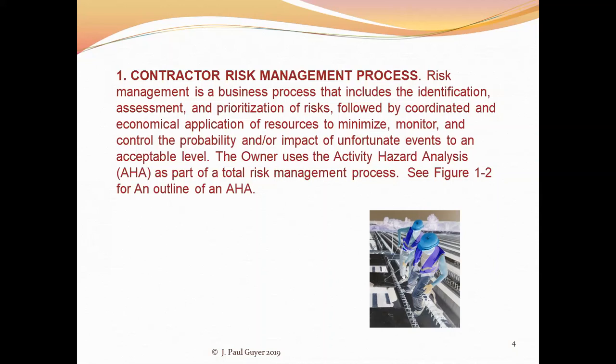And so you identify generically in a risk management process, identify the risks, assess them in two ways, for their potential to occur, and then the consequences of an incident if it does occur. So a particular type of incident, the chances of it occurring are limited. So that kind of decreases its importance, you might say.